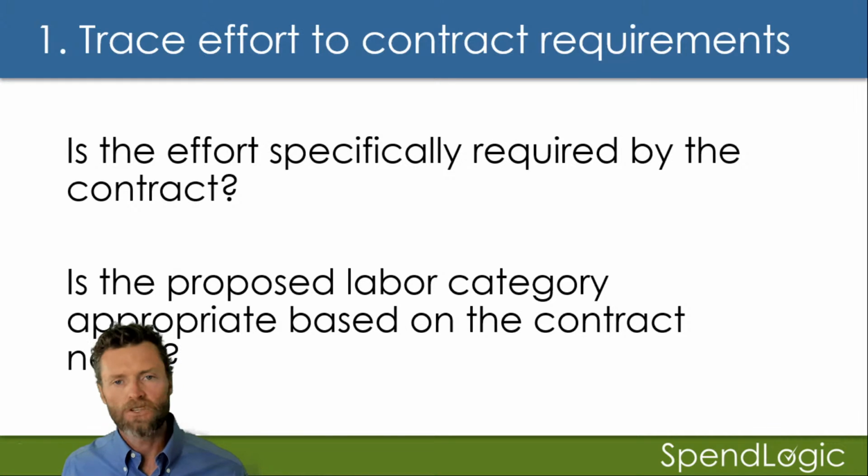You just got to get an understanding of the proposal, look at their basis of estimate, look at their proposal, look at the RFP, and make sure that it's a 1-for-1. If you don't know, again, go back to your technical evaluator or send them an RFI with any questions that you have. Don't move on too far until you get an understanding of this. If you don't know if they've proposed enough or if they proposed too much, then you really can't do an effective cost analysis.